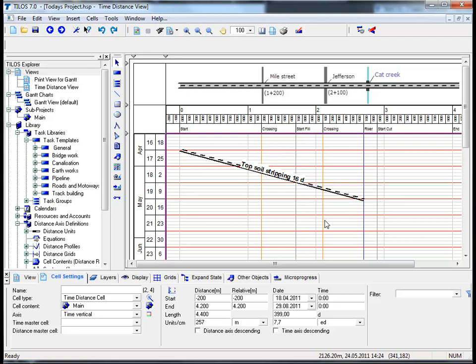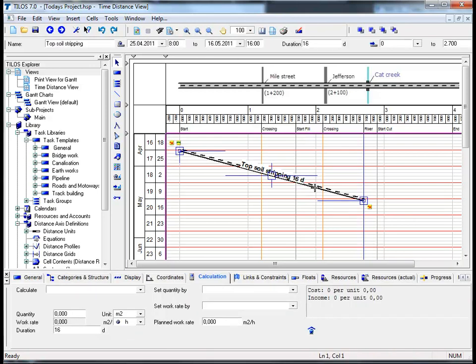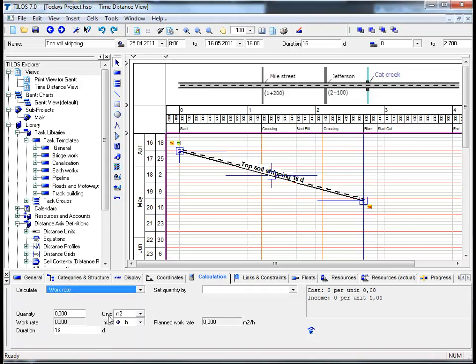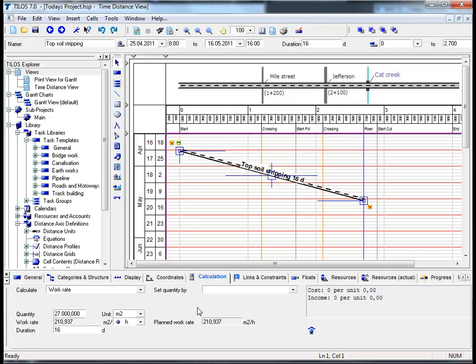The next phase of this TILUS tutorial deals with task calculation. In order to calculate a task, please highlight it first, then proceed to the calculation view tab in the details toolbar and choose work rate from the calculator drop-down menu. The quantity field in this example is very important as it measures the volume of work to be completed - insert 27,000 and hit return. You can see that the planned work rate is 210.937 square meters per hour, communicating to all project participants the level of productivity required to finish the job on time.